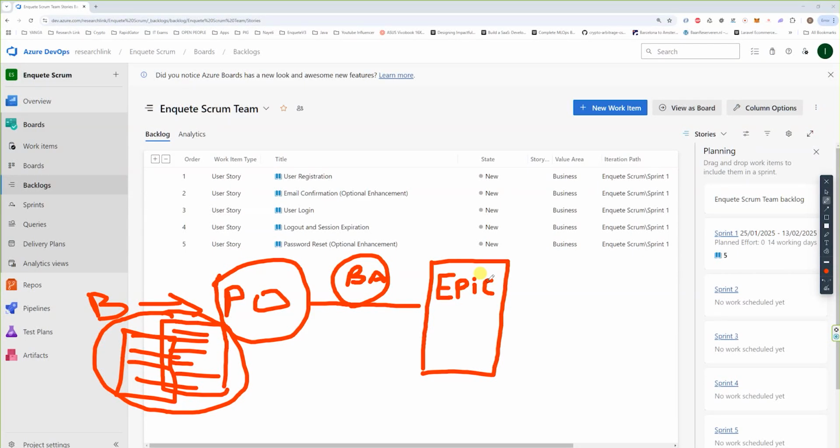So you're going to say, on travel to Nigeria, the first epic will be preparing the kids' clothes. Then another epic will be preparing travel plans. Then maybe the last epic will be buying gifts. So you have 3 epics, right? If you look at those 3 things I mentioned, they're still very high level. They're just very big.